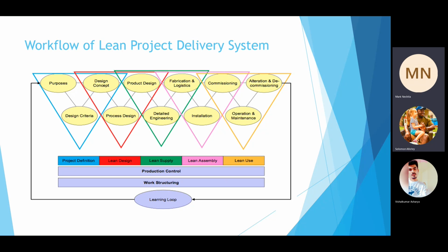The first stage or phase of the project delivery is called project definition. The purpose of this stage is to look at the project as a whole and define what the project will deliver, what its value is, and also what has to be put into the project to obtain the wanted results. This is where constraints such as time, location, cost, and regulations are defined in conversations with the stakeholder or end project user.